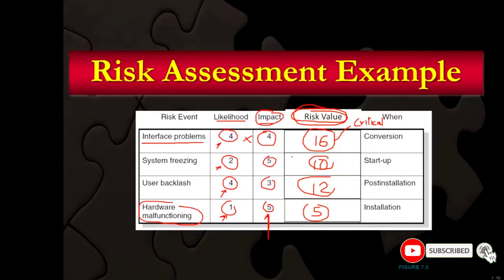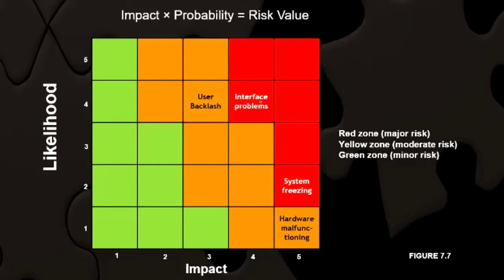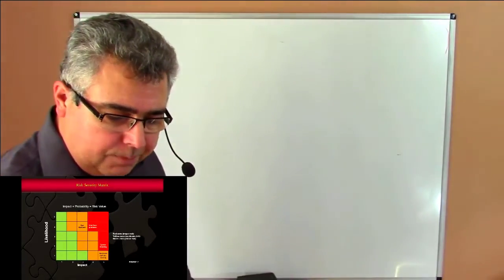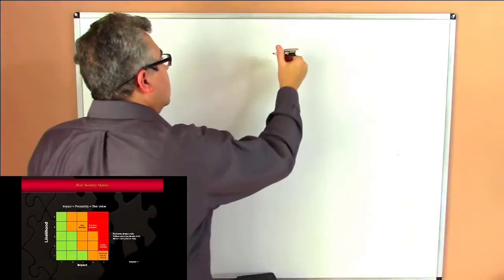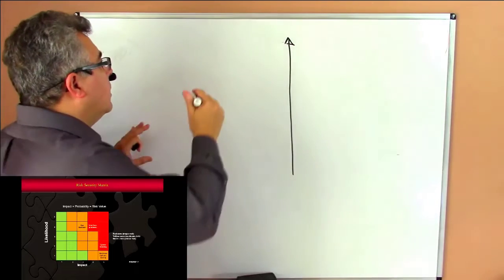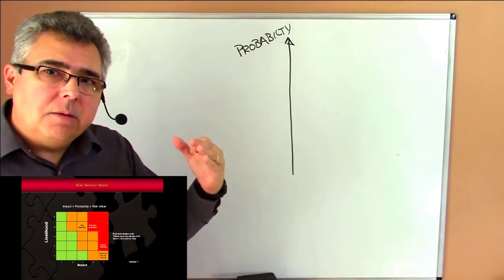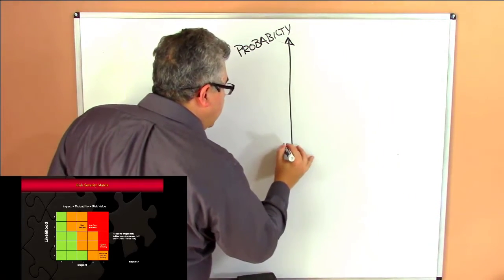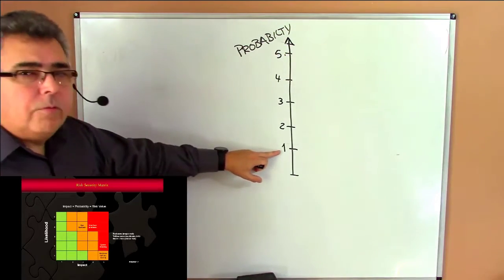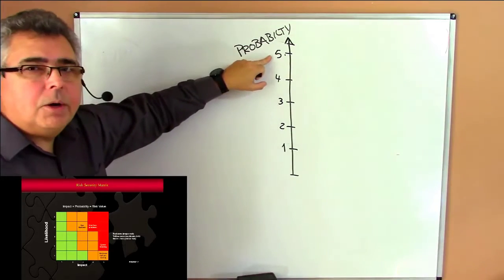How to show those things to a customer in a simple way that a customer can understand — we use a diagram called the risk severity matrix. What is a risk matrix? We put two dimensions on the chart. We draw a vertical line that shows the probability level: very high, high, medium, low, or very low probability. This is related to the probability score: very low probability = score 1, low = score 2, medium = score 3, high = score 4, very high = score 5.